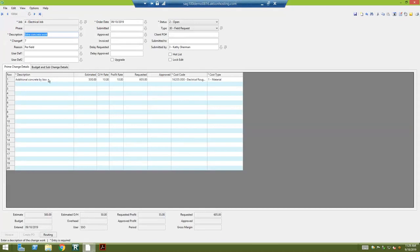On my change order screen, I have two tabs. The first one is prime change or owner change. That's the one that's going to change our contract amount.